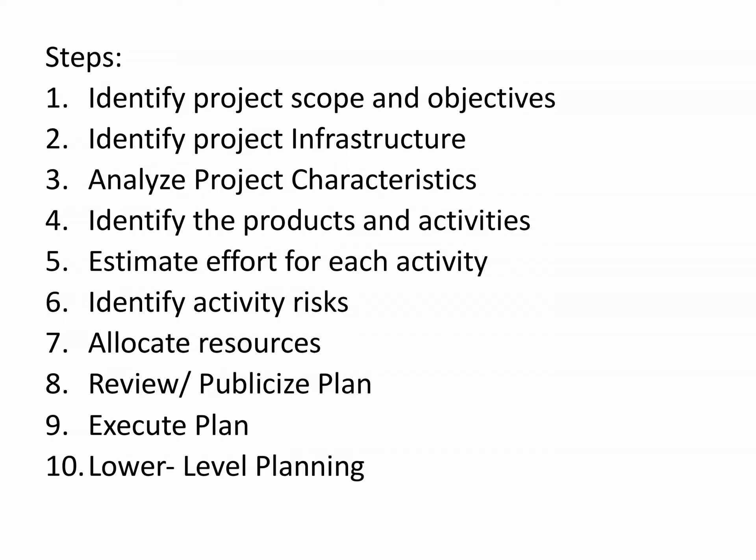Step two: identify project infrastructure. Step three: analyze project characteristics. Step four: identify the products and activities — you have to identify which activities produce which products. Products might be as simple as a trained staff member or particular documentation. A product need not be a finished deliverable; we are talking about all the products of the various steps and activities. Then, step five: estimate efforts for each activity.